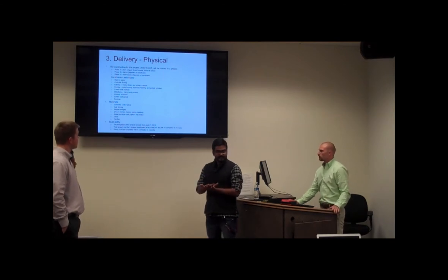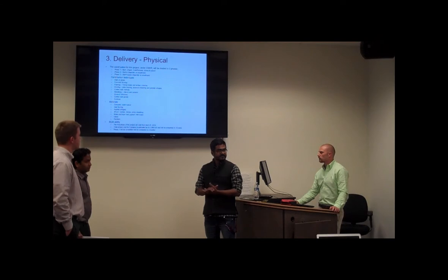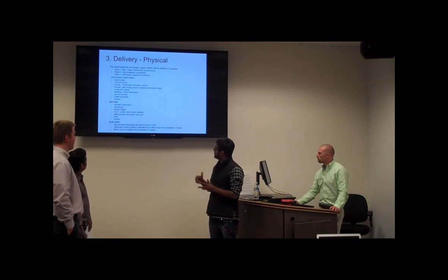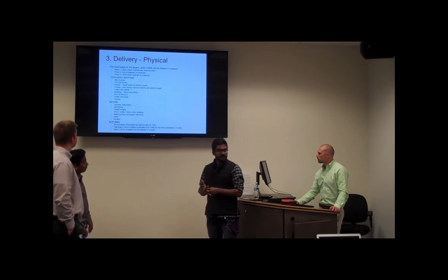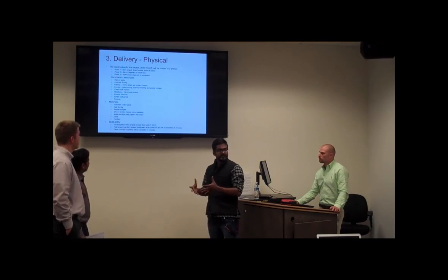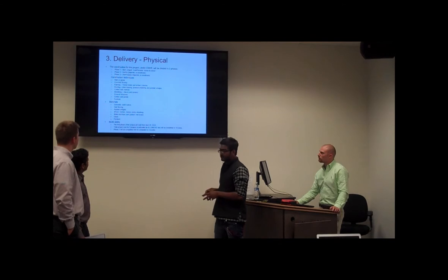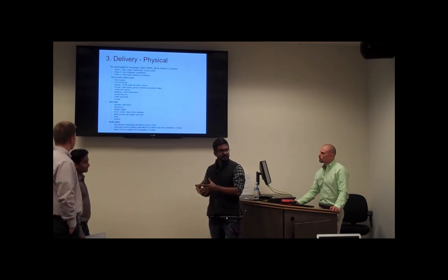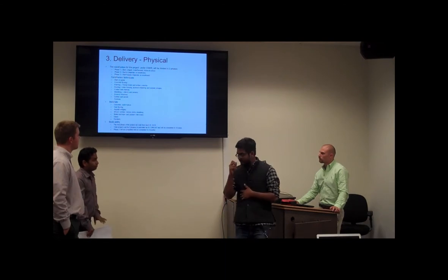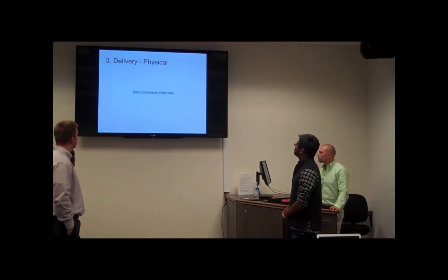Well, mostly the materials are the slab on grade, on which timber frame would be installed with gypsum panels, and for the roofing we would have asphalt shingles. The first phase of the project would start somewhere around April 2015, and it would go for 450 days, and the later phases would be the second and third phase, which would be covered in the presentation. Next.